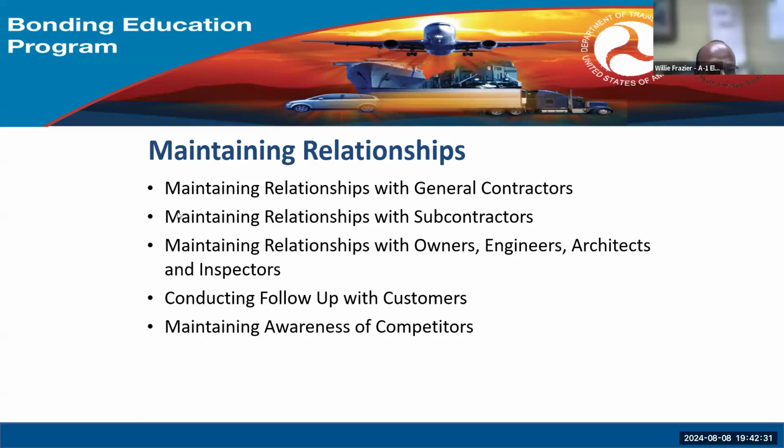I would just like to say, this is Willie Frazier with A1. The point you made about the daily construction reports was a very good point. I had a project one time, and I believe in keeping good records. I bought a construction document book that was bound together. I had a disagreement on the job with the general. I was a sub at that time. He had asked me to do something, and I recorded every day the weather, how many people I had on the job, all this kind of information.